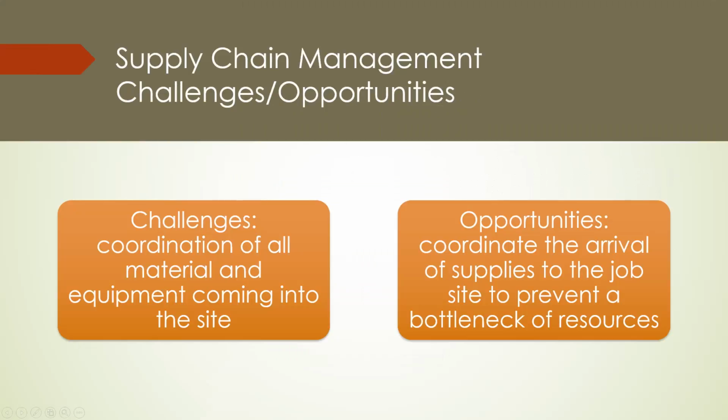Okay, back onto supply chain management. Here are some challenges and opportunities. The challenges with the supply chain are related to coordination of all material and equipment coming into the site. Site preparation is comprised of a series of sequential activities, and much attention should be given to planning each step or phase. For example, when the site preparation includes large quantities of concrete, the project manager must accurately predict when the concrete needs to arrive. This requirement necessitates coordination with the concrete supplier.